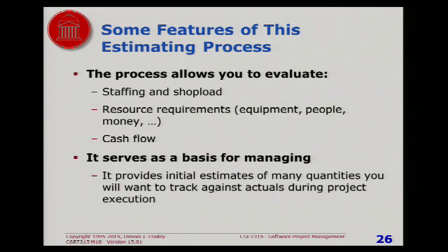The reason you want to know the cash flow is that sometimes on a big project, you don't get all the money all at once. You get the money for the first part of the project, and then if you're successful, you get the money for the second part of the project, and so forth. So you have to estimate how much money you need for the different parts of the project.